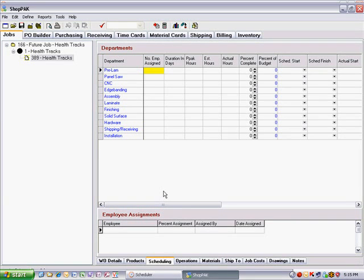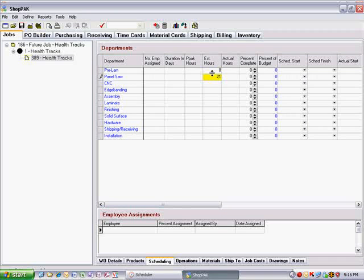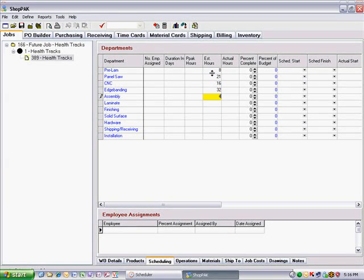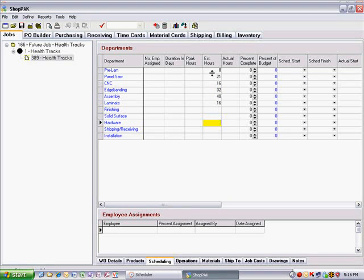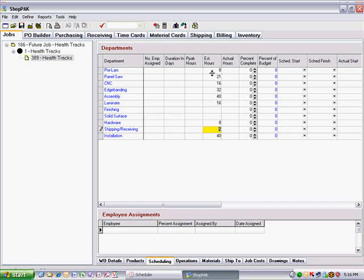Now the hard part. You must forecast what the hours will be for each department that you anticipate the job will go through. Since one work order now represents the entire job, the estimated hours will be much larger than you typically see on work orders that represent distinct sections of the job.